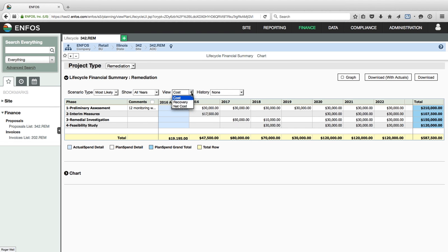And that's under the assumption that you do have some cost and you do have some recovery, right? If you're done spending on a project and you're only recovering, then no, you wouldn't have to. But if you have a cash flow forecast for spend and you have a cash flow or receivable forecast, then yes, they need to be entered in the same plan and reviewed and approved or rejected at the same time.